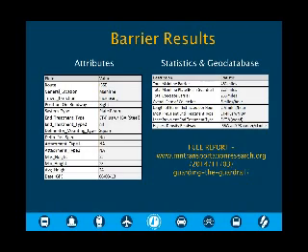But this can be kind of a tricky part, I think, of any agency, is determining and talking to key experts of how much data should you be collecting. What is the right granularity? Collecting more data is going to take more time, and it usually is going to cost more money. But you also want to be sure that you can answer the questions that need to be answered. So again, we were trying to keep the project cost low, and we didn't get into too granular of details.